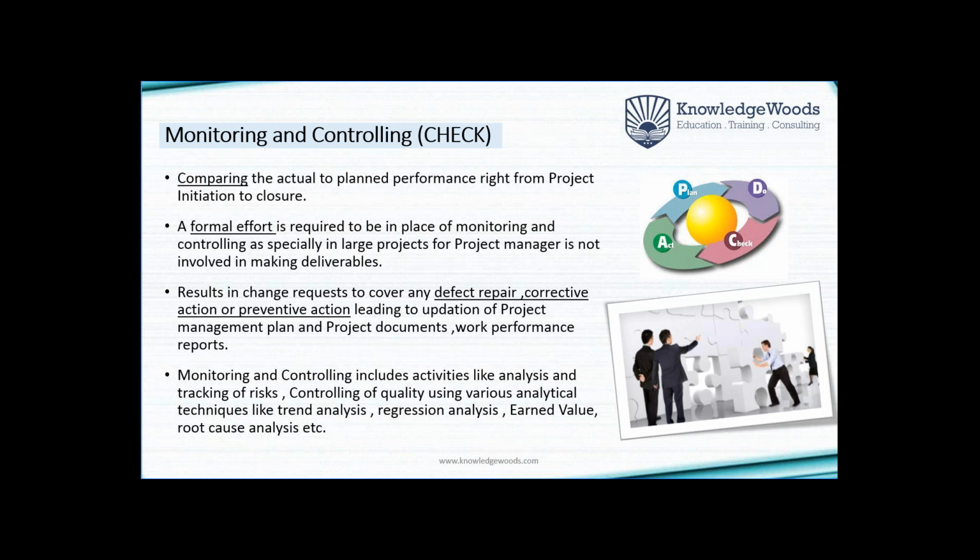For example, you take corrective action by increasing the resources or increasing the time, so the revised timelines are in line with the way we are implementing. Or you ask why we are falling behind, why there is a negative variance.